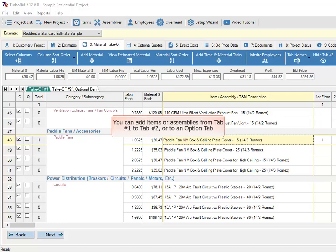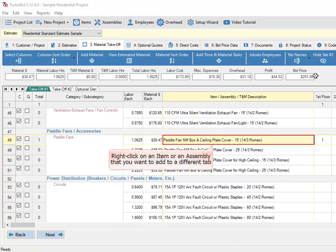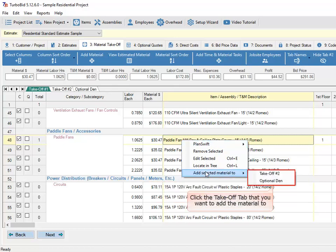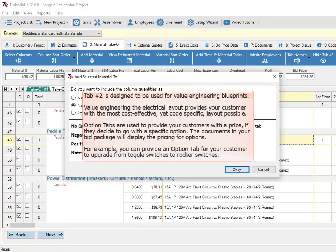You can add items or assemblies from tab number 1 to tab number 2 or to an option tab. Right-click on an item or assembly that you want to add to a different tab, click the Add Selected Material To menu item, then click the Takeoff tab you want to add the material to. Tab number 2 is for value engineering blueprints, providing the most cost-effective, code-specific layout. Option tabs are used to provide your customers with a price for a specific option — for example, upgrading from toggle switches to rocker switches.